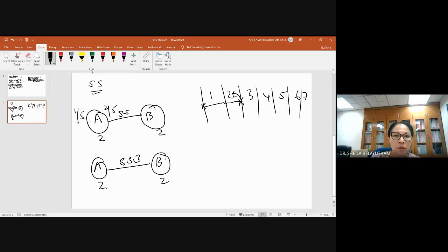Okay, so start to start relationship. So this one is straightforward. If you start activity A on the 1st, you will start activity B on the 1st also. Okay, so start to start. So 2 working days, same. So you will finish on the 2nd also. Okay, so coming backwards, 2nd, minus 2 days, you will start on the 1st. Okay, so start to start, you start on the 1st here. Activity A will also start on the 1st. Plus 2 days, you will finish on the 2nd.